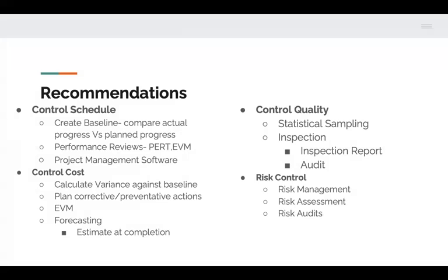Additionally, the expense for the project must be audited by an independent firm, as is protocol with the Belize Tourism Board. For risk control, the project manager should perform risk assessment to identify new risks, reassess current risks, and close risks that are no longer relevant. Additionally, risk audits should be conducted to examine and document the risk responses in dealing with identified risks and causes, as well as the effectiveness of the risk management process.